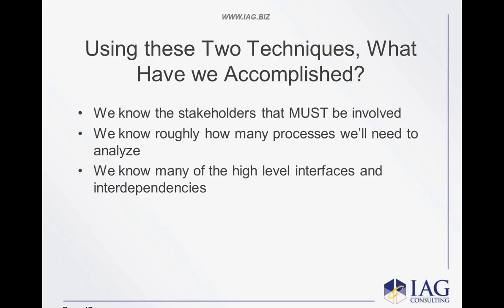At what point in time do you ensure you have the right people at the table? Right now, Ruth, you've got to figure out you've got the right people. Your stakeholders tend to be upper management. They're not involved with what actually happens. So you want to sit down and say, who understands that process? Because they're going to assign people to work with you. When you get down to this level and say, we're talking about a customer order management system, and we're looking at the pricing of it, and this piece over here, you're specific enough that upper management can assign a particular person to you, Ruth, to work through that.